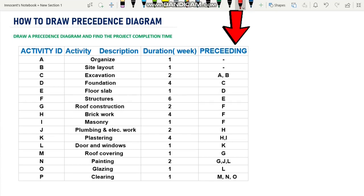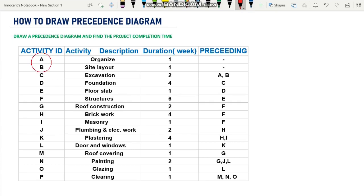Lastly we have precedence. In order for one activity to start, there needs to be a preceding activity that has ended. For example, in order for activity C to start, activity A and activity B need to finish. Activity A and B start at the same time, which is why we have a dash in the precedence column. Activity D must wait for activity C to finish before it can start — you cannot jump from activity A to activity D without following the precedence.